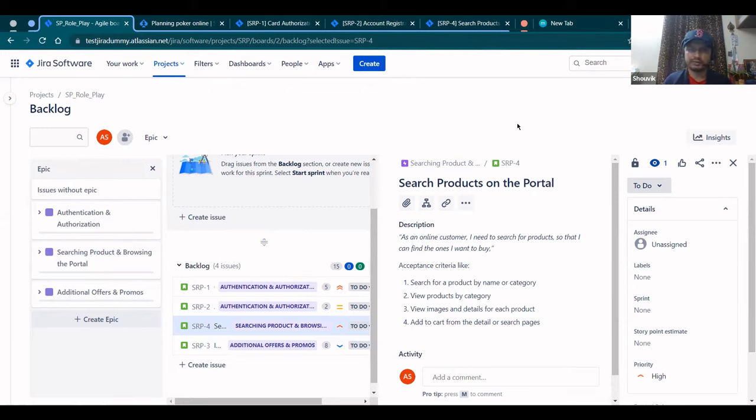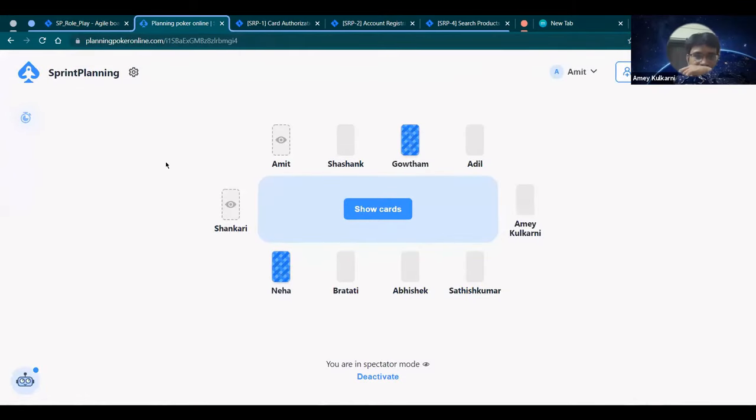So we can get into the planning poker. Okay, so guys, while giving the score, think of the login functionality, which is our benchmark story that we completed in our first sprint. So that was a two-pointer, very basic. So compare this story with that relatively, like how bigger or how complex is this story in comparison to that,